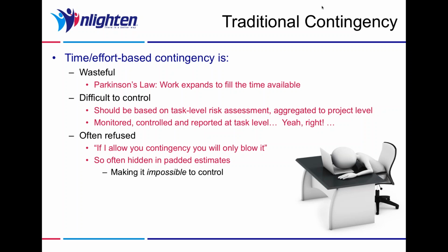In traditional project approaches, so going back to my days before DSDM, I used to go through a process of gathering estimates for the work and all of that good stuff, and then I used to request a percentage of extra time and extra effort to act as my contingency. So I would understand that maybe it would take 6 months to deliver something in this project. I'd ask for an extra 3 or 4 weeks of contingency just to protect the project overall against those uncertainties.